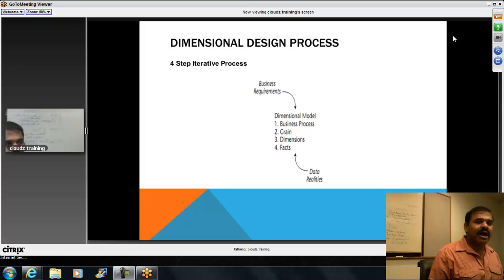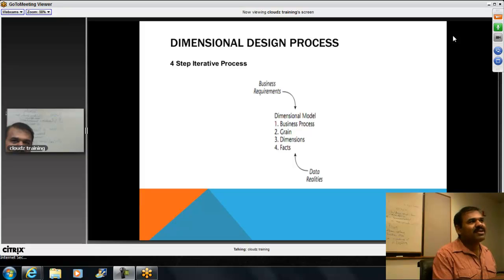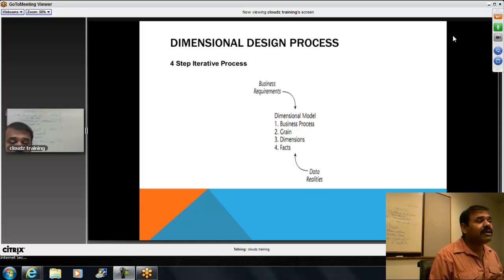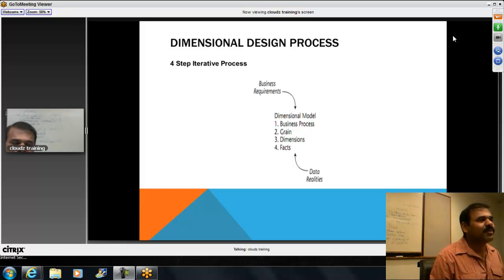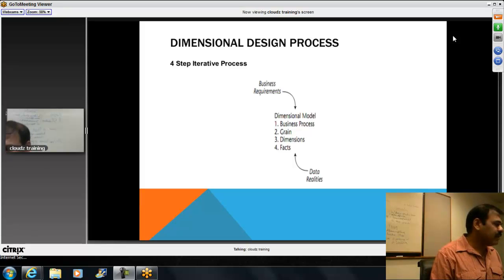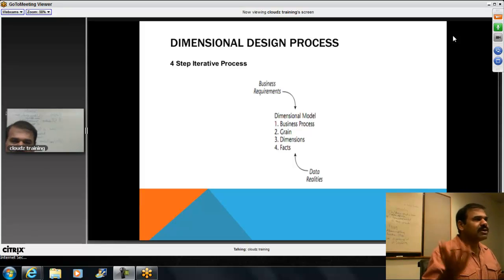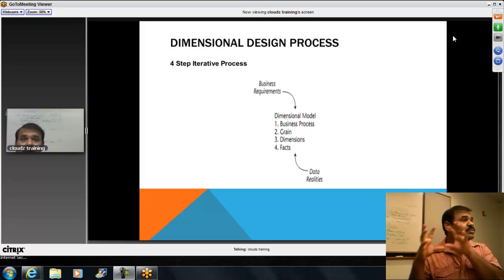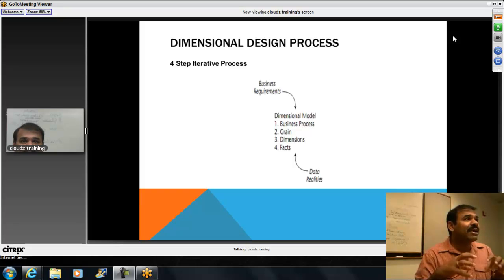You finalize requirements one by one — for example, someone asked for a swimming pool, so you need to find space in the backyard, but how big you can build determines the scope of the project. You will have to define the scope and set up expectations properly. If you say you will fulfill every requirement, you will be in trouble — the project will be over budget and over time. You have to identify the most important things that can be fulfilled.